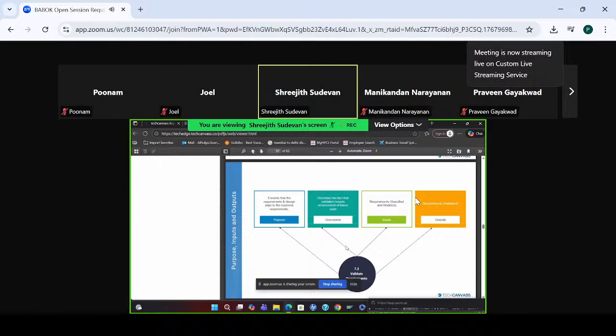You will try to compare it with the business goals and business objectives we have. But there will be some specific business requirements, right? As per the business requirement related to the login, when we compare all these features, what we get to know is that the OTP feature we wrote was not part of the business requirement. As a BA, we'll get creative and write those requirements, but it was nowhere mentioned that they want an OTP option.